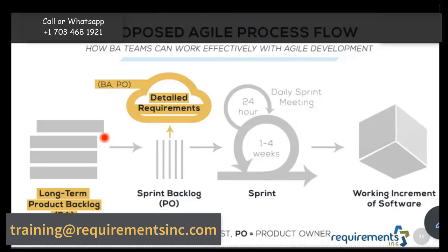once you make sure that no boxes are empty, then you might get into, okay, let's fill in some of those details. Let's look at the top 10 boxes and make sure that they have all the details needed for the sprint team to pick up, because the sprint team, all they do is look at the top of the backlog, because that's what they'll be working on. So in this meeting, there are a few things that we do on a customary basis, right? First thing is make sure that the top 10 boxes are full. The sheets are there, the details are there, meaning the title is there, what the user story is intended to do, that is there. And the next concept is called acceptance criteria.